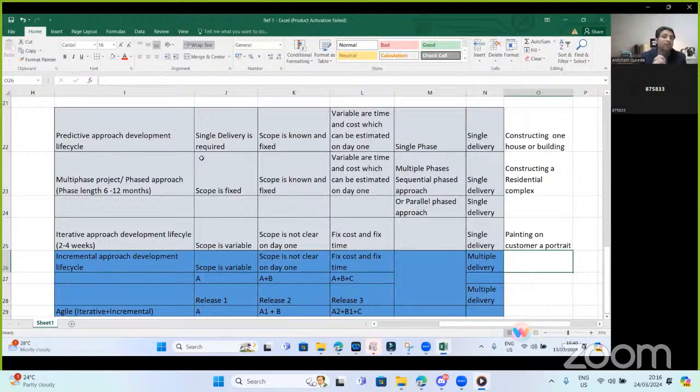Thank you. All right. So if I, as a project manager, coming back to the example, construct my school, and then I look around and I don't find the instructors, and I don't find the curriculum, I cannot start the school with the kids onboarding, right? So someone should ensure that the school is ready by that time. There should be instructors ready and the curriculum ready. Then we can kick off one school and say, okay, we achieved something. In the end, the children started to go to the school. So that's the program manager role: he or she ensures that the projects are managed in a coordinated fashion so that the benefits we need to achieve through these projects can also be achieved. That's a program manager role.